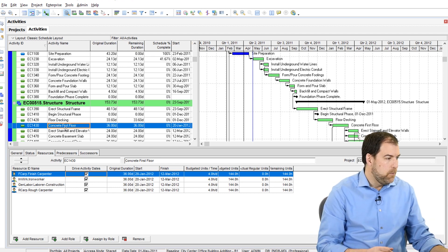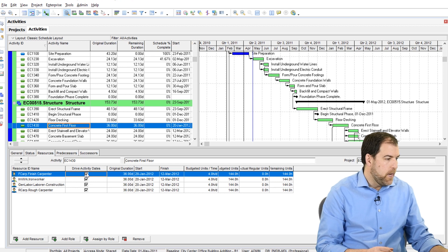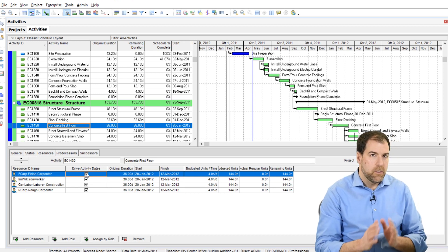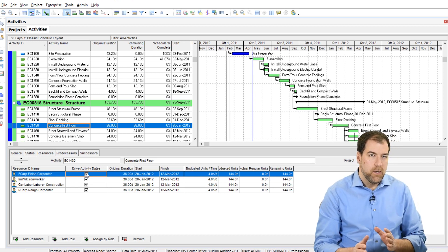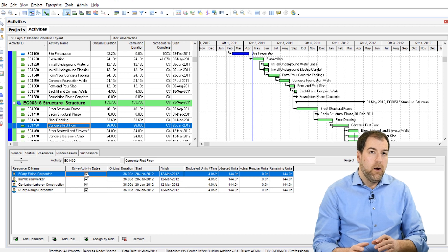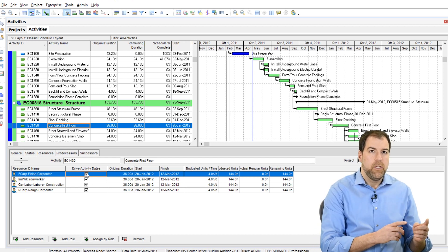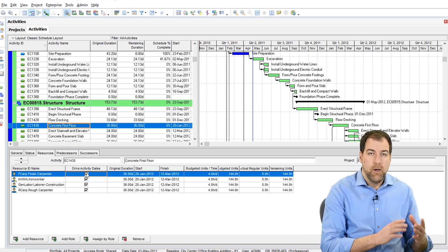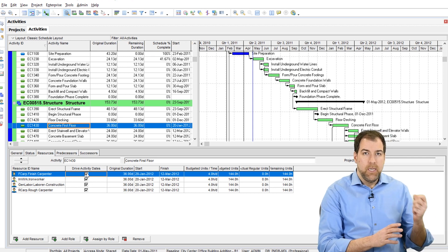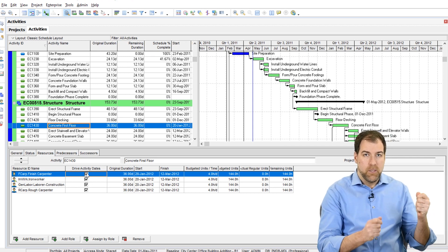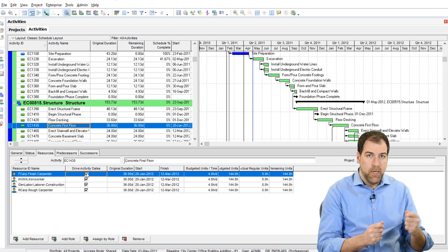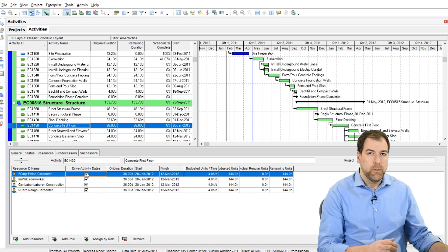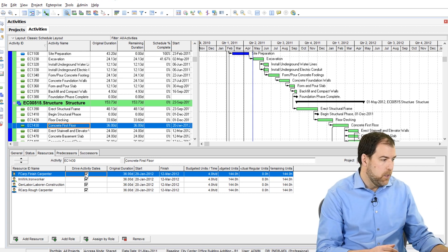Well, let me show you exactly what it means. It means that the duration and the start and finish dates of the assignment actually drive the duration and the dates of the activity. So the dates and durations of the activity and the assignment are coupled together. But it's possible to unlink them. And this is where you'll see what this does.